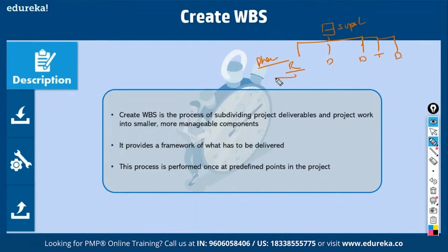Then from this phase, you define what the major deliverables are. For example, requirement documentation is a major deliverable. Requirement documentation for what? Well, Reuters interface, then Bloomberg interface, then interest rate interface, all the requirement documents. So you come to the lowermost level, that is called a work package or deliverable. This is a process of decomposing work into the lowermost part, that is called a deliverable.